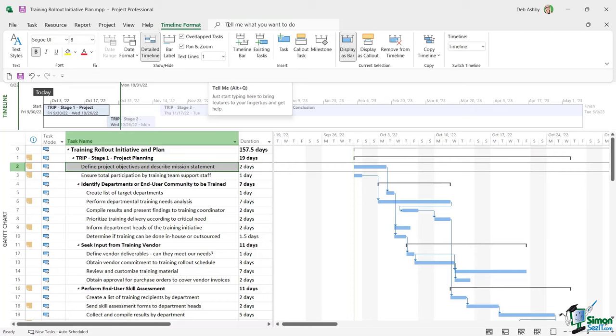Also make sure 'Auto link inserted or moved tasks' is unchecked — in my experience having this ticked can get messy. On the Save page, specify where project files are saved by clicking Browse and selecting your preferred folder. This means every time you save a new project file it automatically opens to that folder. Also check the Auto Save setting — I'll change mine from 5 minutes to 20 minutes, saving the active project only.